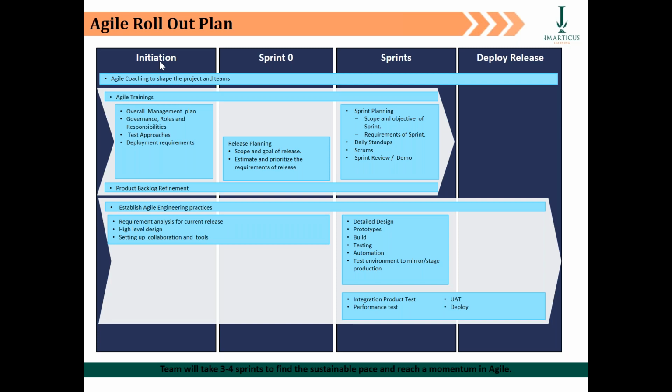Obviously, the total requirements for that phone was about, let's say, 20 numbers, 10 for internal features, 10 for external. So the feature team number one got 10 features to develop. They decided that they will need around 3 sprints minimum to develop the number of features. Then we said 3 sprints, which means the 10 features have to be done in 3 sprints, which means at least 3 features per sprint. And 3 features per sprint were to be done in typically about 3 to 4 weeks. In there, the sprint cycle time was larger. Okay, so that's how, guys, we went about.